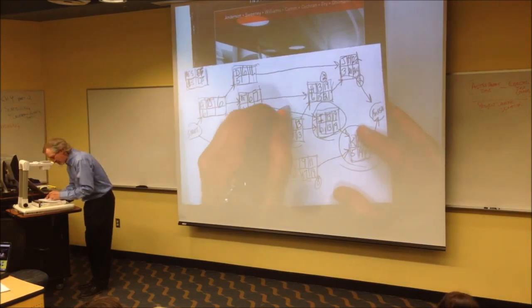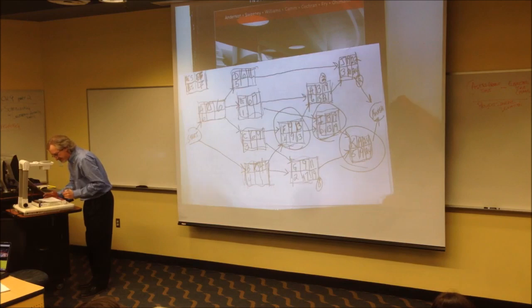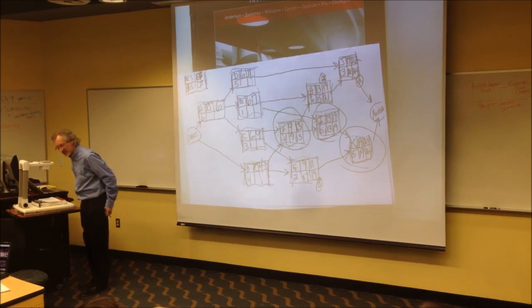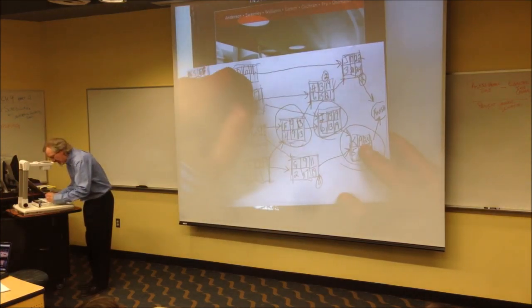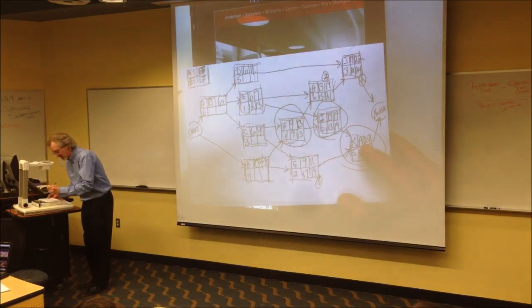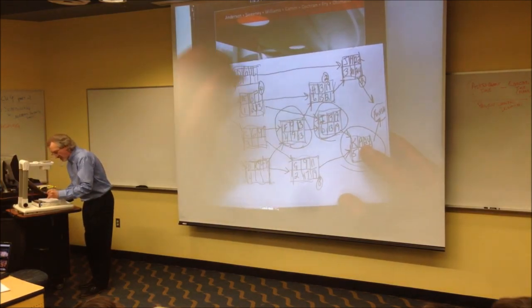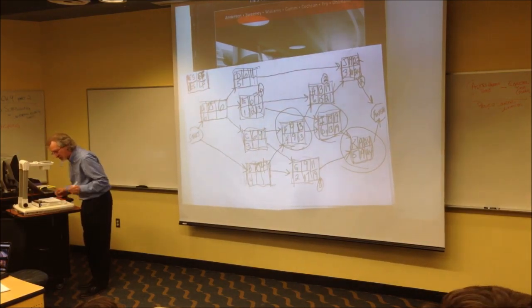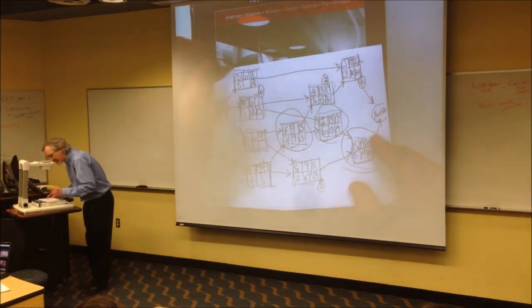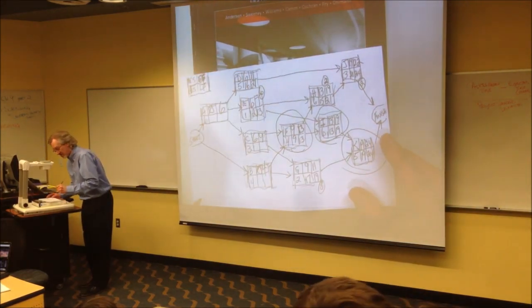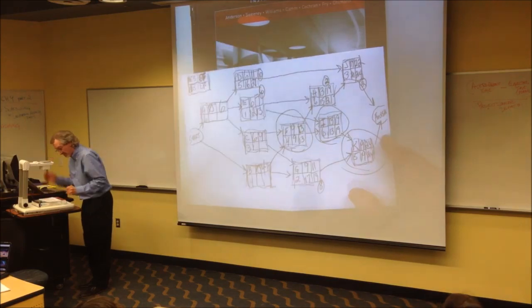There we go. E. E has both H and I after it, so what are the 2 numbers we're looking at? 15 and 13, so we use 13 minus 1, 12, slack. How much? Thank you. That was E. D, we only have 1 activity after it, so we use which number? 21 minus 5. 16, slack 10, that's a big slack.